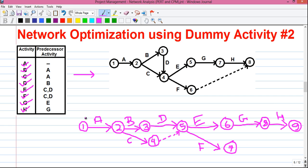So our starting event is event one and our ending event is event nine. But here you can see activity A is finished before the actual project or the actual network is finished, which is an error. This error is called dangling, D-A-N-G-L-I-N-G. Dangling refers to finishing an activity before the actual project is finished or completed. So we have to connect it to the final event using a dummy activity. This completes our network diagram.